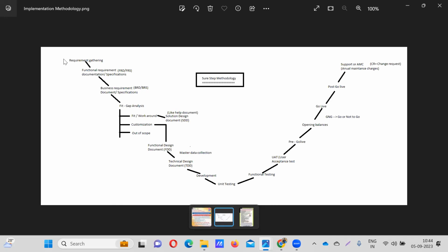When we are doing the testing or coordinating with the client, for that purpose we can add 2 to 3 hours more. For the safe side, we can give them more estimation hours. Total 3 plus 6 is 9 hours, and you need to add 3 to 4 hours, better for the safe side. 9 plus 3, 12 hours. So you need to give the estimation to the client: I need 12 hours to complete the customization. If the client approves, we can proceed.